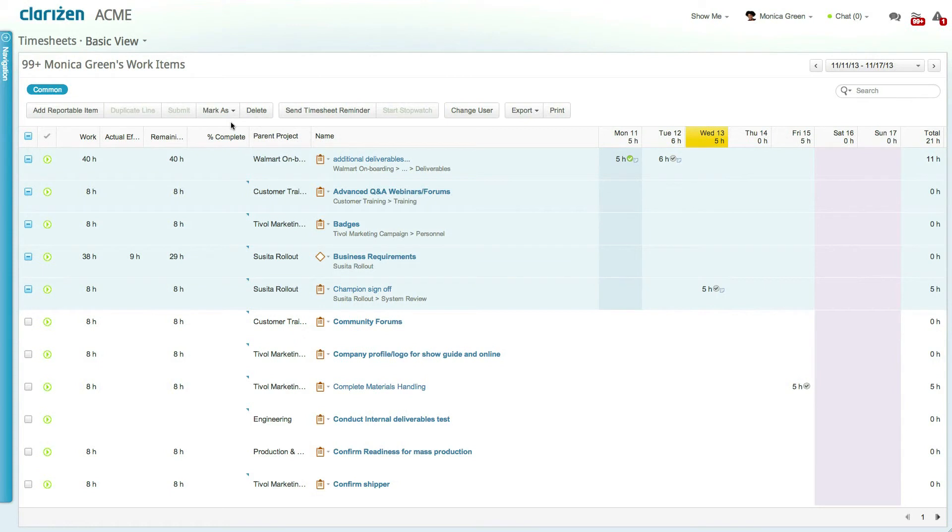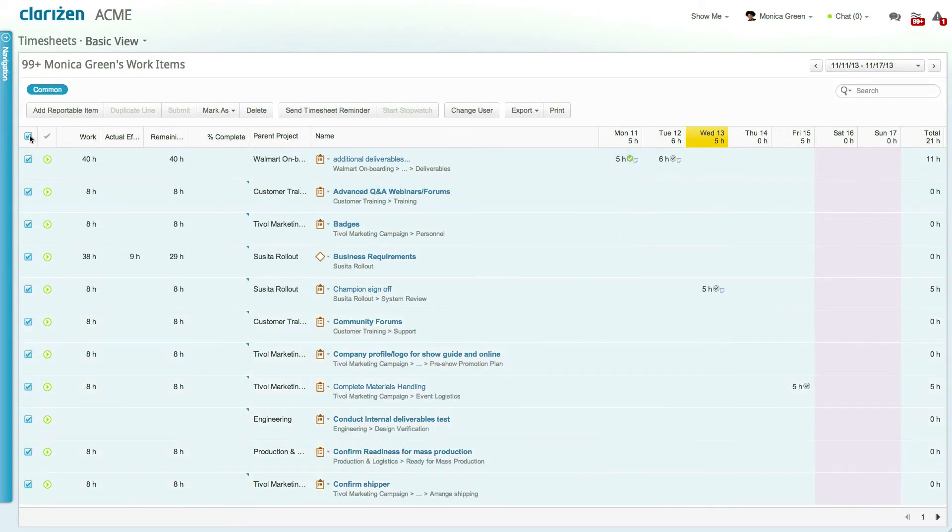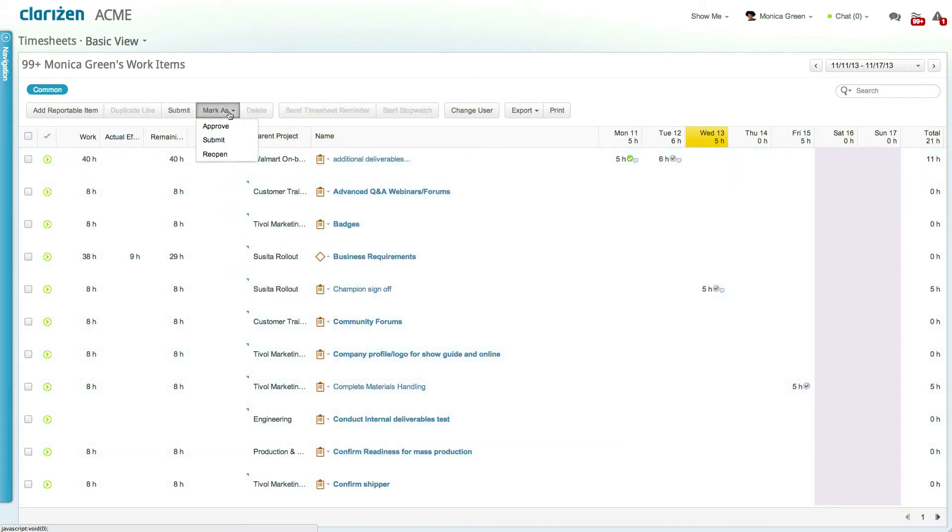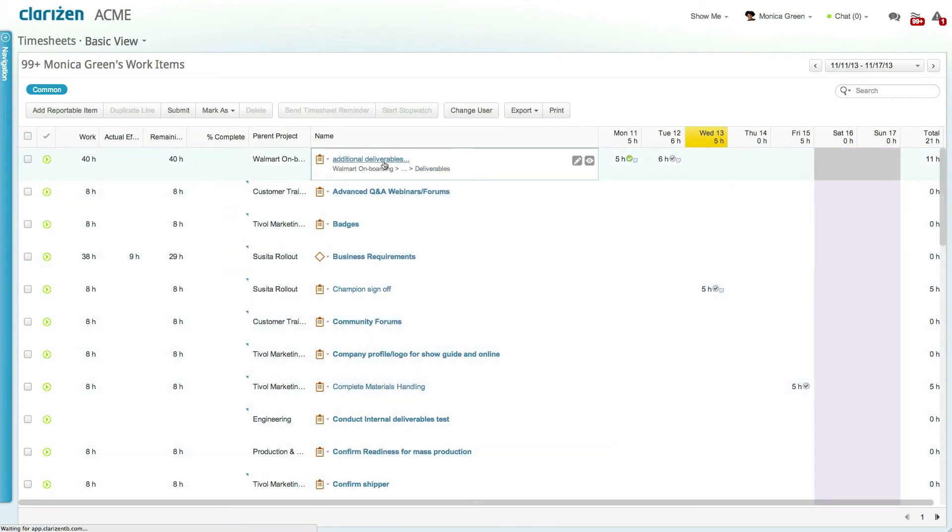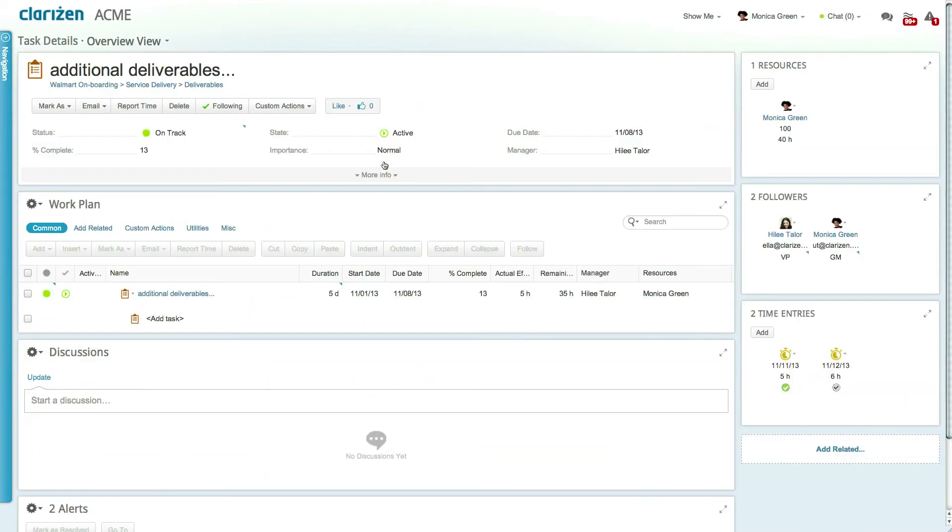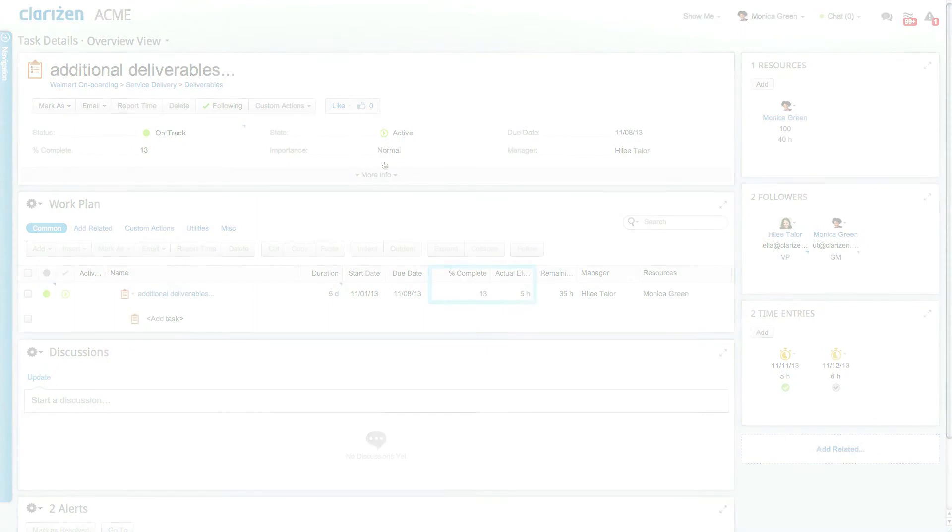Alternatively, the entire timesheet can be approved by either selecting All Rows or selecting No Rows and clicking Approve. Once approved, time entries can affect the actual effort and progress of their related work items, depending on your organizational settings.